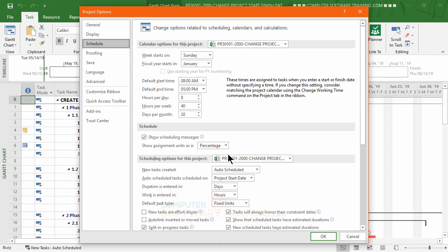So if you're running 24 hours a day, you might say, okay, this particular task is going to take 6 hours. This particular task is going to take 18 hours, right? So you'll get the 6-hour task, and right after that is the 18-hour task. They'll come right after it, and most of that day would be taken up, or the whole day would be taken up, and then some into the next day, right?